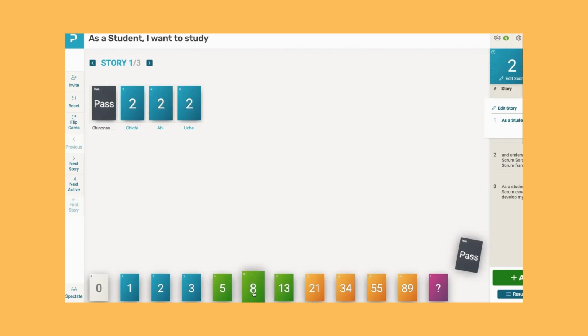So you definitely don't want your team to be estimating 13. Any story they are estimating at 13 story points, you want to make sure that they split that story into 2. So your story points should be ending on 8 so that it can be contained in a 2-week sprint. Unless your company is doing 1-month sprints, then it's okay to estimate a story at 21 story points, right? 1 story. But if your company is doing 2-week sprints, whenever a story goes over 8, even at 8, you need to start thinking, team, is there anything we can do to split the story?